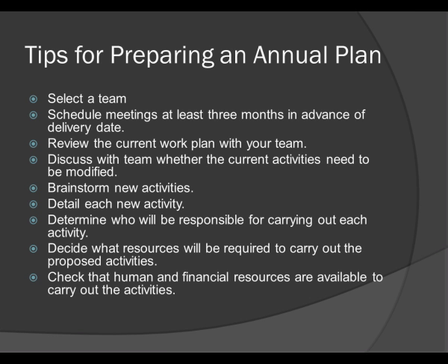Review the current work plan with your team, discuss the current activities and whether they need to be modified, brainstorm new activities and detail each new activity, determine who will be responsible for carrying out each activity, decide what resources will be required, both human and financial, and check that these resources are indeed available to carry out the activities.